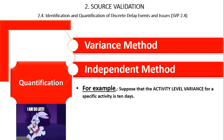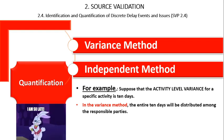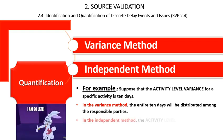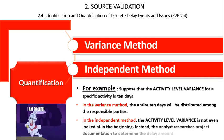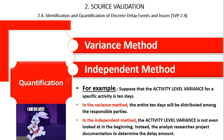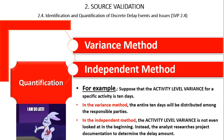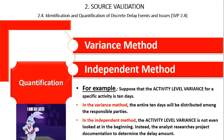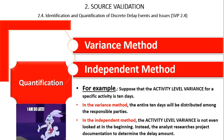In the variance method, the entire 10 days will be distributed among the responsible parties. However, in the independent method, the activity-level variance is not even looked at in the beginning. Instead, the analyst researches project documentation to determine the delay amount. If the project document states that the activity was delayed three days by an event, the remaining seven days of the activity-level variance will not be assigned to this delay. If the documentation states the delay event was 12 days, the analyst will consider the delay to be 12 days, but since the activity-level variance is 10, the other two days may have been made up via acceleration.